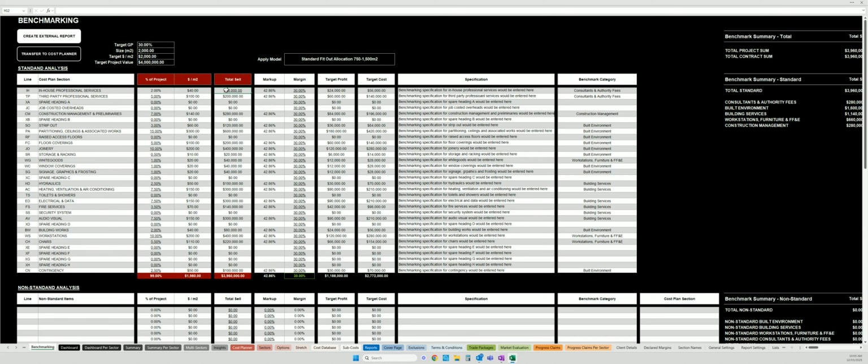Because we've dropped $40,000 off this number, we may be able to put $40,000 elsewhere. We may actually go, this client, the joinery is important to them. We're going to add that 40,000 into the joinery. So we're going to increase the allocation of joinery. And you can see what's the master cell and what's the slave. So you can see these underlines mean we're using the percentage to allocate the total cell, and any item that's underlined in the total cell, it means that is the master, and these numbers are reflecting that.